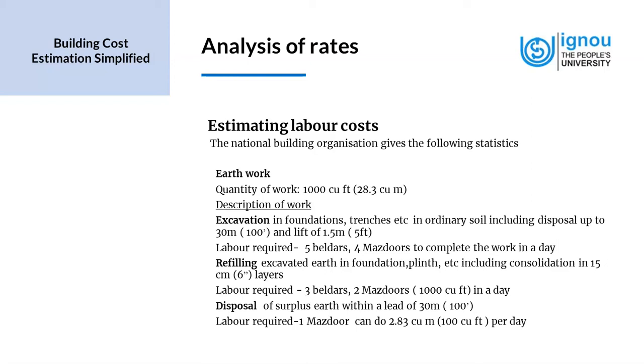So when we are given the description of work for earthwork, we have excavation, refilling, and disposal. And for each activity, we have the labor breakdown as to what are the categories of labor that we need. And since we know the labor cost for each of these labor categories, we can easily find out the cost of earthwork, and this can be incorporated in our estimate.